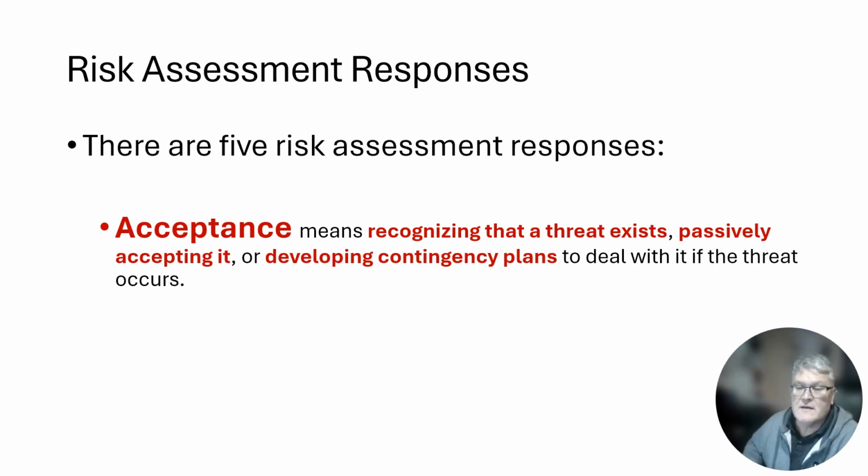Another risk assessment response is acceptance. Acceptance means recognizing that a threat exists, passively accepting it, or developing a contingency plan to deal with it when it does occur.